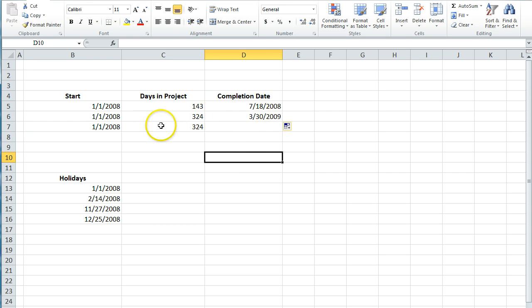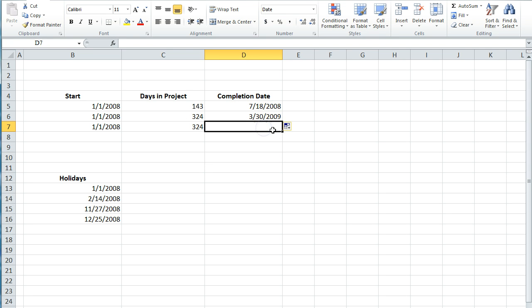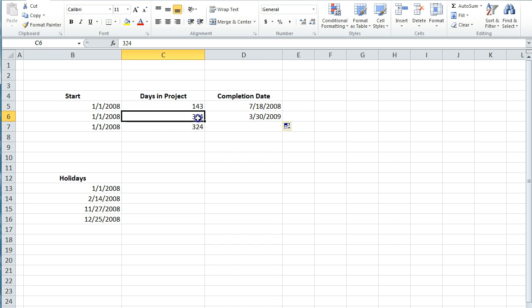And so if we pull this down, this project is going to go until March 30, 2009. And keep in mind that this is calculating work days. This is excluding weekends. That's why 324 days takes longer than one year. Because you're only getting five days every week.